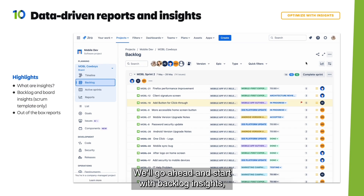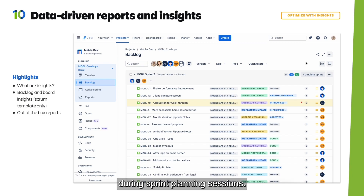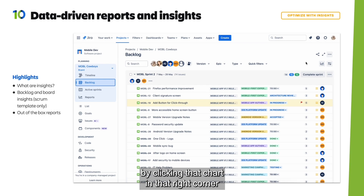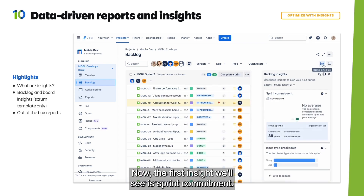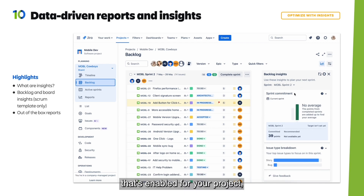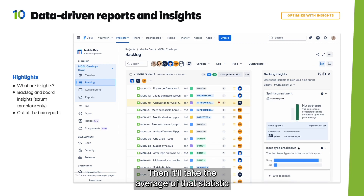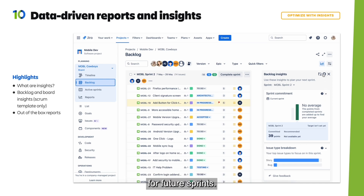We'll start with backlog insights, which provide support for you and your team during sprint planning sessions. You can find the backlog insights on the backlog view by clicking the chart in the right corner and then clicking Insights. The first insight we'll see is sprint commitment, which looks at the estimation statistic enabled for your project — whether that's story points, issue count, or time logged — then takes the average from the last five sprints to recommend a target range for future sprints.